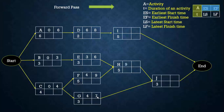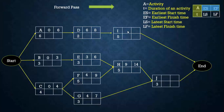For activity H, it needs input from both E and F, so it must wait until both are complete. The earliest start time of H is the maximum of the earliest finish times of E and F, which are 6 and 9 — the maximum is 9. The earliest finish time of H is 9 plus 5, which is 14. For activity I, it needs input from D, so its earliest start time is 8, and the earliest finish time is 8 plus 5, which is 13.